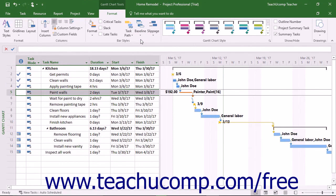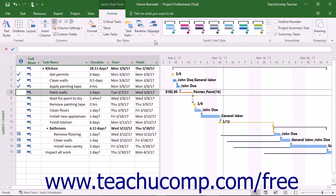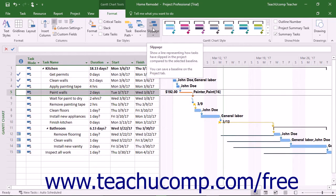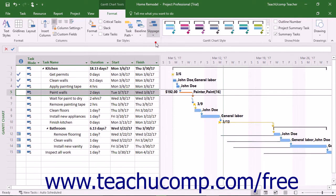To view the amount of slippage within project file tasks when compared to a selected baseline, click the Slippage button and then choose a baseline from the drop-down menu. This shows task slippage lines in the Gantt Chart where tasks have gone over the amount of time scheduled in the baseline. You can repeat this process to toggle the display of the slippage lines back off when you are finished.